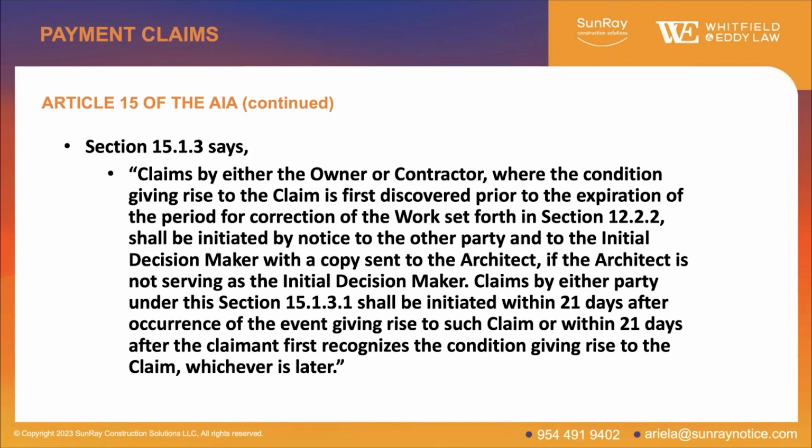Now, one caveat, I don't have a slide on this, but under the A201 2017 version, the AIA expressly excluded from a claim any owner claim for LDs, for liquidated damages. And so that's a big change, because it used to be an owner had to give this written notice of any claim for liquidated damages, but the AIA has specifically excluded that. So as contractor, keep that in mind. You're not entitled to any written notice of a claim for LDs from the owner like you used to be.